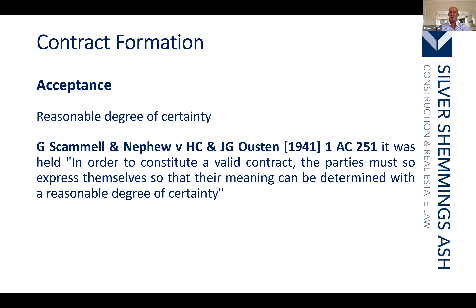Even where an offer has been accepted, there can only be a contract if there is sufficient certainty. A judge must be able to understand what the parties entered into. We can imply a reasonable price or a reasonable timeframe, but if the scope of works has not been clearly identified — what a party is actually to do — that creates a problem. I have seen contracts where the works are so uncertain that there is no contract.